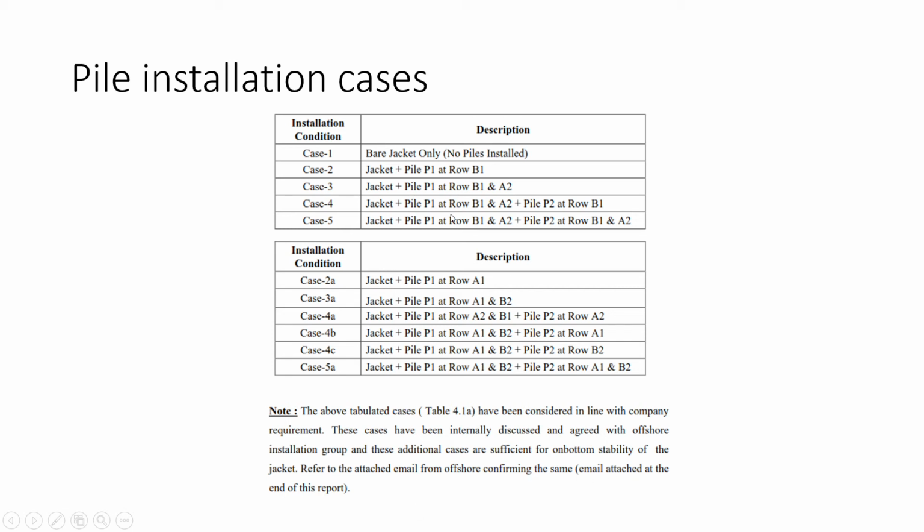Okay, so now you can install the piles as per your wish, no problem. Theoretically you can do these conditions when you have to issue the document to the client. Before that, if you are the EPC contractor, because in an EPC contract you will have your own offshore team in your office itself, you have to go and check with them: sir, this is what I'm doing, whether you are comfortable or not, whether you are okay. Like that you have to get concurrence.